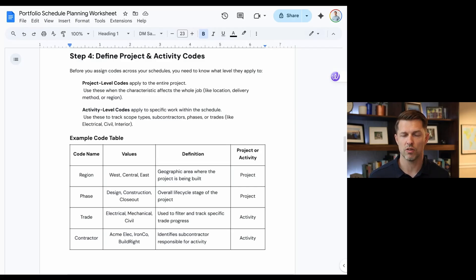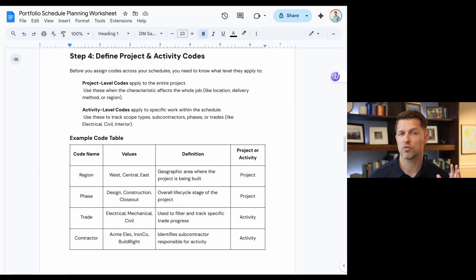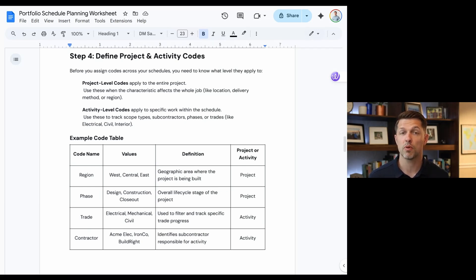Once you have a standard set of milestones, the next place to look to standardize is activity codes and project codes. These codes help extract the data, but they also help us filter and sort, which is a key component to portfolio reporting. For example, you might have project codes for region — maybe you're working across west, east, and central — or for what phase the project is in, such as design or construction. If you had a thousand projects, you could quickly see the 300 that are only in the design phase.